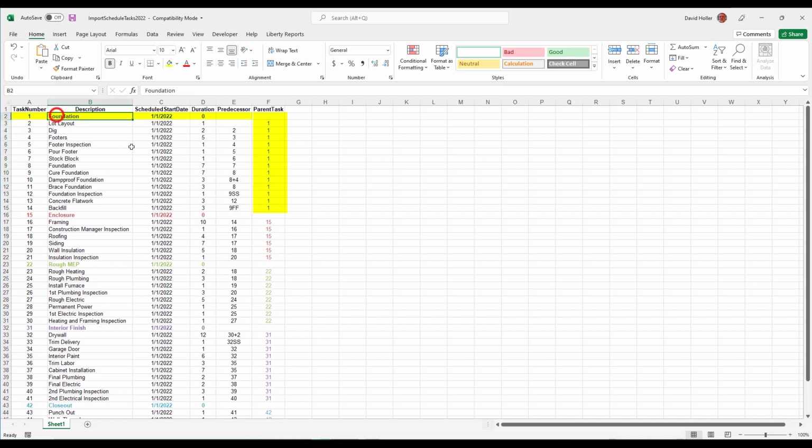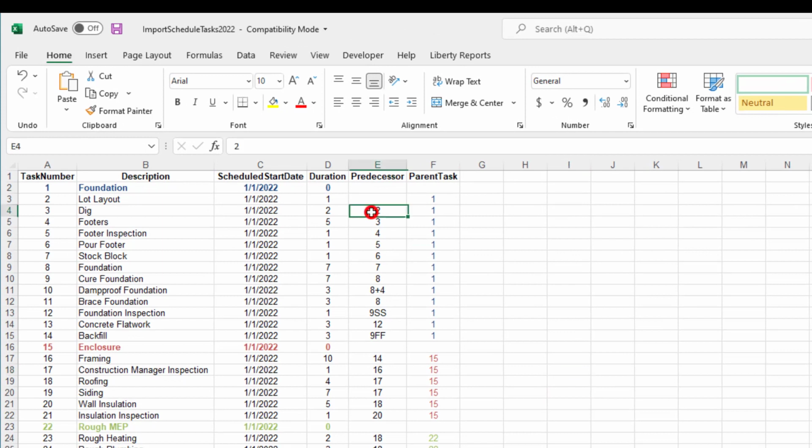So foundation is the parent item. Everything below that to this point is the child task. Another parent, child task. Parents just become similar to milestones and are ways of grouping and organizing your child tasks. You can also use the common nomenclature for project scheduling software.